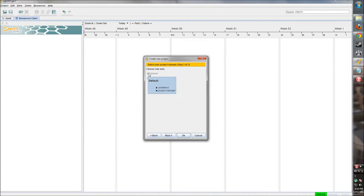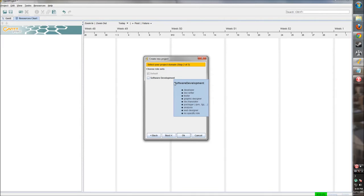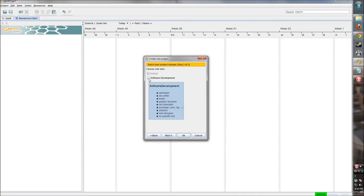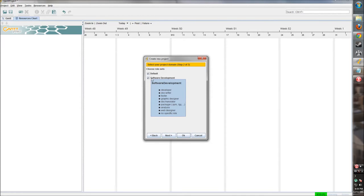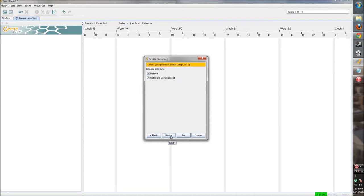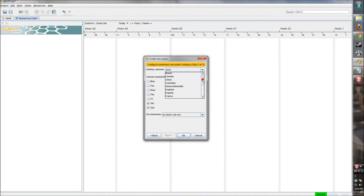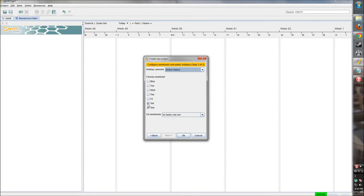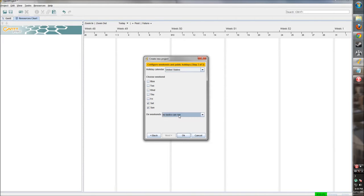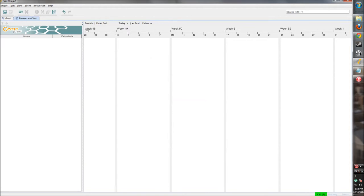Before when we were creating Bob, we saw that his roles were rather limited - it was undefined or project manager. So here, if we click on software development, we get a little more granularity in terms of what people are doing. It includes developer, doc writer, tester. We can set resources to these new values, which is pretty helpful. You can set a holiday calendar so tasks won't be worked on on certain days. Let's choose United States, and choose the weekend days. Saturday and Sunday are the default weekend days, and on weekends we want everybody off so that no tasks can be run those days. Click okay.